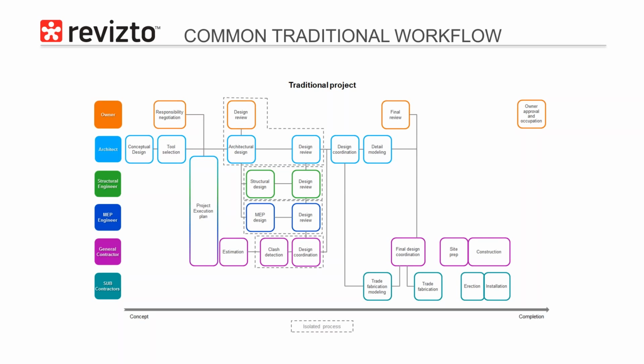And the other organizations that are involved in the project don't know about these types of things until a new set of drawings is released to them or they outright ask for that information. What this can do is create delayed reactions from one trade to another as to how they're going to solve any particular problem.